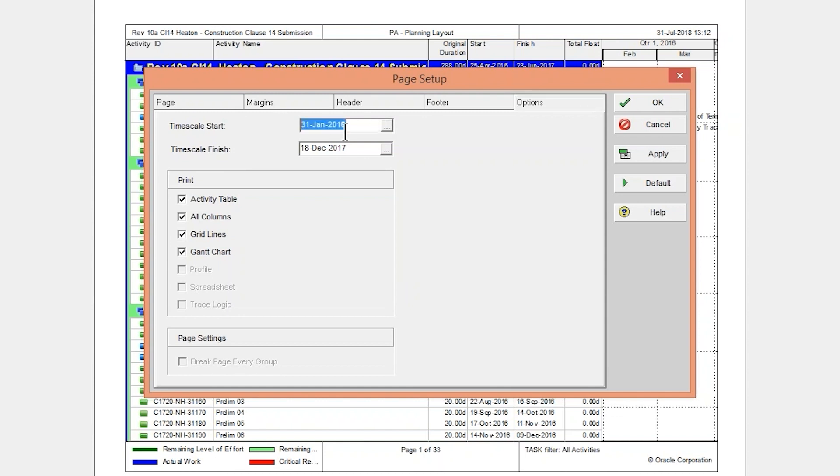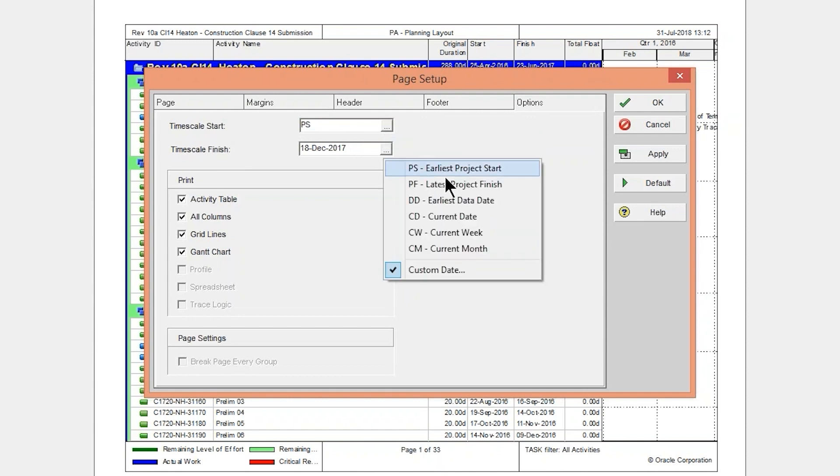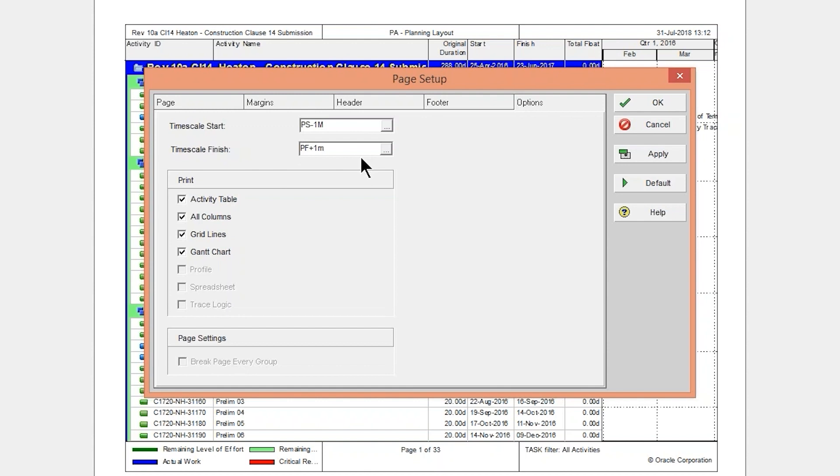You have your time scale, so you can pick from the start of the project to the end of the project. That works really well. And I actually like to alter these slightly. What I like to do is give myself an extra buffer on either side. So, I will take the PS and subtract a month. So, I'm going to do from one month before the start of the project. And I'm also going to add one month after the end of the project. It just gives my time scale a little bit more so that I don't have stuff right on the line.